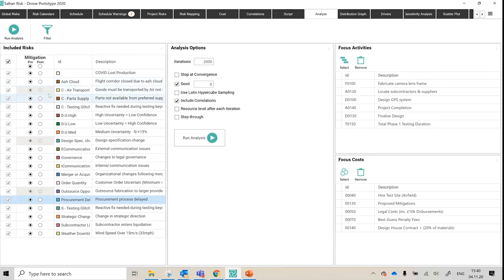The grey boxes that are around some of those risks, notice this is the opportunity we looked at on one of the slides earlier, where we had the mitigation with the optioneering presentation, but we had it as an alternate position based on action. So these 3 grey boxes represent all of those places where the mitigation measure drives whether it is a pre or a post mitigated position. So if I don't want to see a grey box there, I have to go back to the risk register and untoggle that.